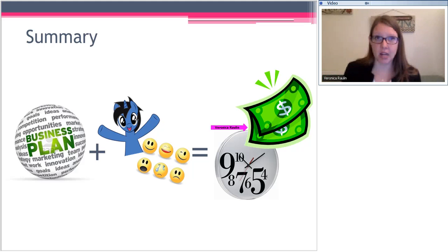That's one idea. Another thing is just to remember that some changes are fast and some are slow. So keep revisiting some of those pieces. Your stakeholders and what they need will change over a multi-year project, so make sure you understand that change management is not static. You will go back. You will want to look at new stakeholders as new requirements come up and keep that refreshed in everyone's mind.